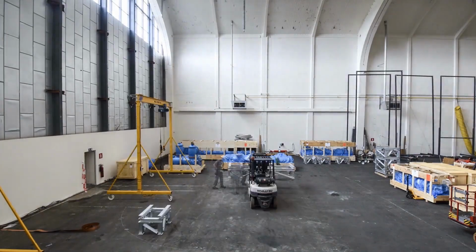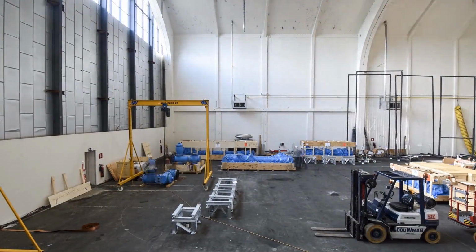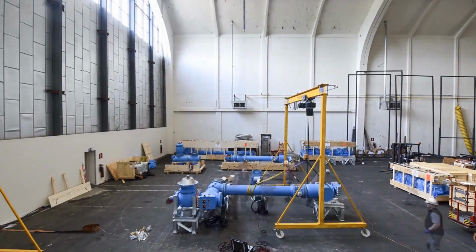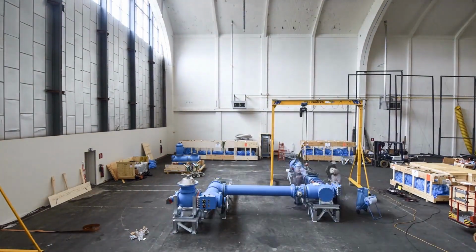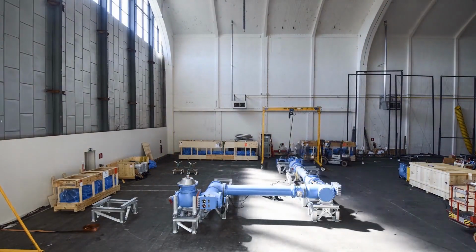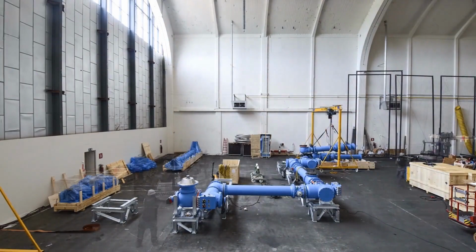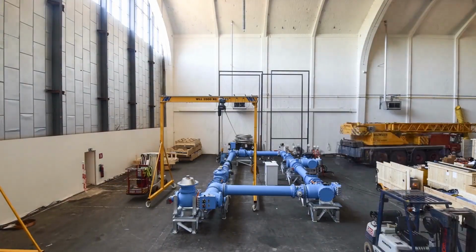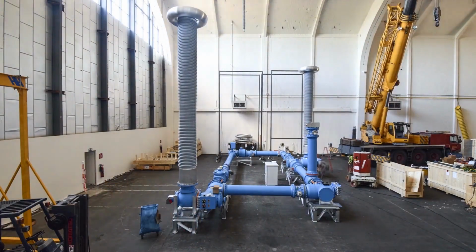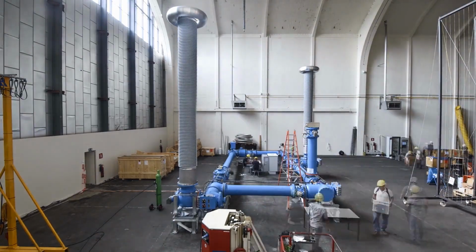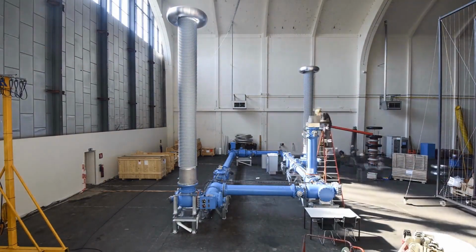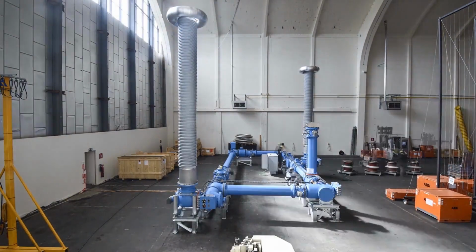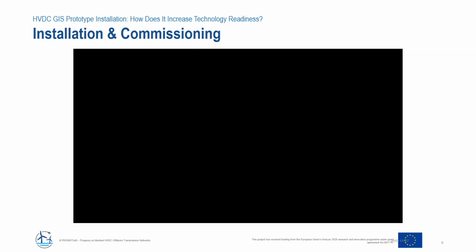In this time-lapse video, you can see the installation of the prototype installation test pool. We start by assembling the factory modules on their steel supports in the form of the basic ring. You can see that all the modules are connected, the cleanliness care is taken. Then we attach the bushings, configure the secondary technology, and then we actually start with the AC commissioning test that's now connected. The high voltage test passes, and after that the test pool is ready for the prototype installation test itself.